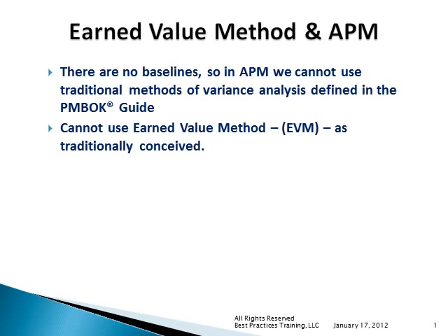In Agile, we don't define all of our baselines up front as we do in the PMI model in the PMBOK guide. They don't speak of even defining the WBS, which would be the heart and soul, the planning step that needs to be accomplished before you do the schedule, before you do the cost baseline. And it's the heart and soul and one of the key parts of the scope baseline itself. So we don't do these things up front.